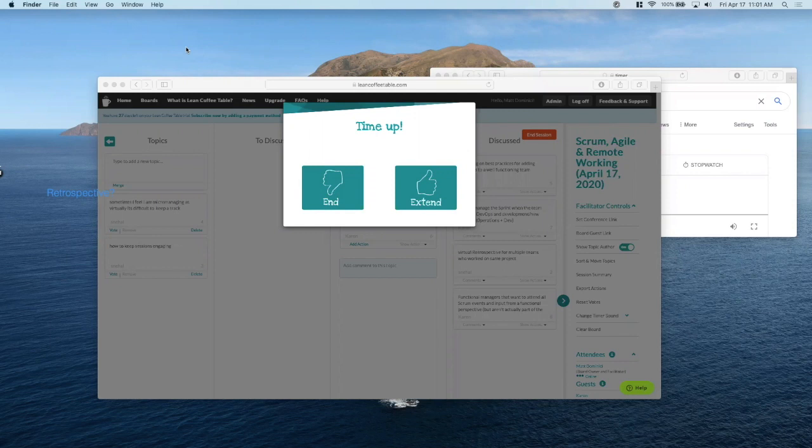And in planning, what I've been starting to do is call out, okay, guys, when they start adding their story points, someone will say it's 5 and someone will say it's 20. It's like, okay, well, guys, remember that this is all the work that has to be done to meet our definition of done. Can you get it done in this time frame?